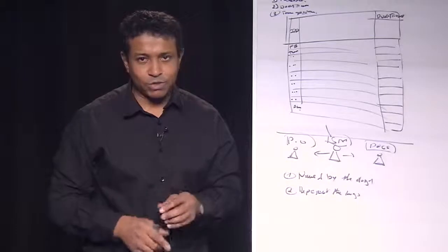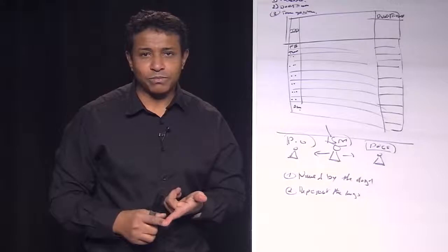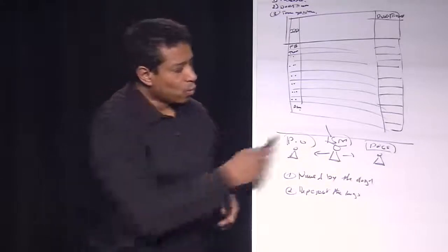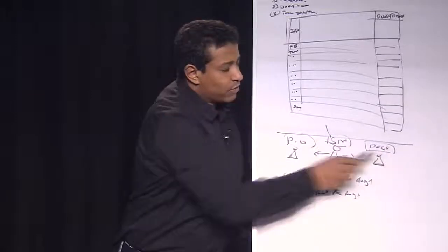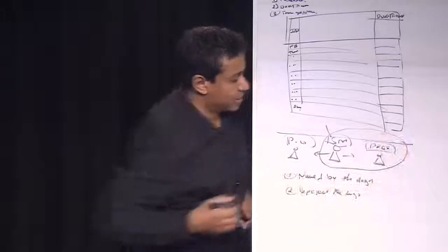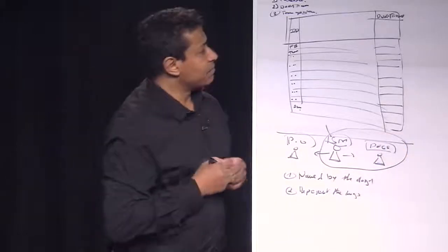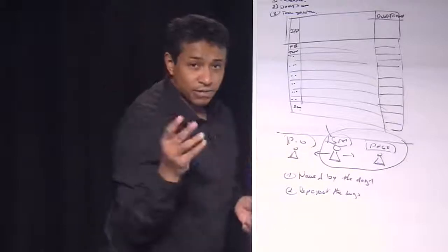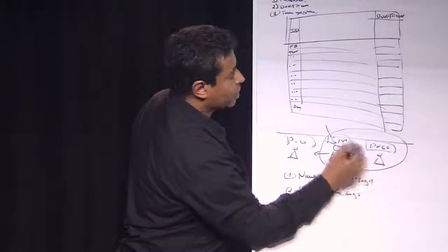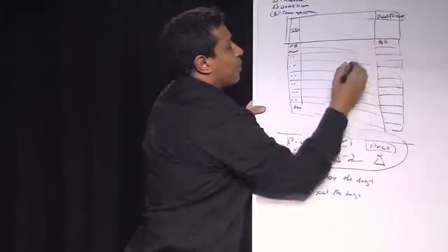if it's possible to be done with our capability. Do we have the capability to do this first? And if so, what is the duration? Two kinds of view for the same problem with the devs. If you want to be correct, we could see a cycle like this, always with the devs. So right after exchanging information with the devs, the Scrum Master comes and says, okay, duration for Facebook, half an hour.